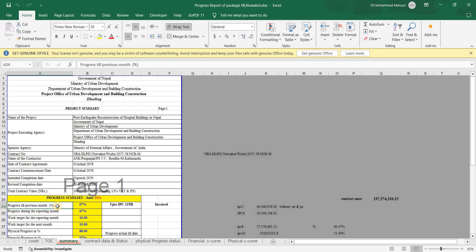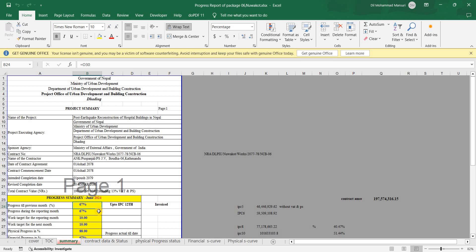For financial progress, we take data from your IPC — interim payment certificates. If you have the last IPC and three payments, you can calculate the financial progress amount. Suppose up to the 12th IPC we had 67% progress — during the reporting month, financial progress will be the same 67% because that is how much we have cashed in.